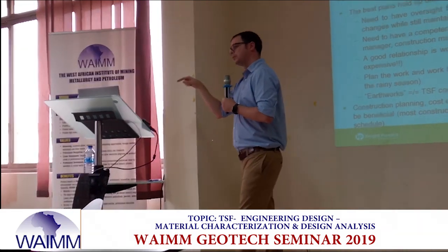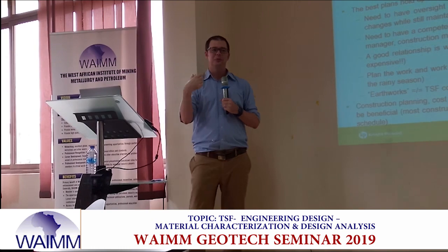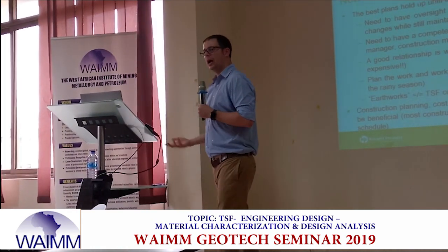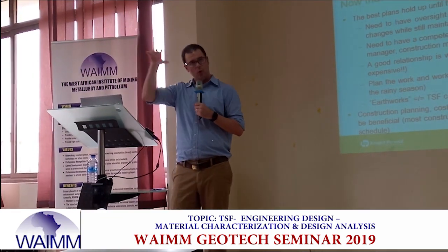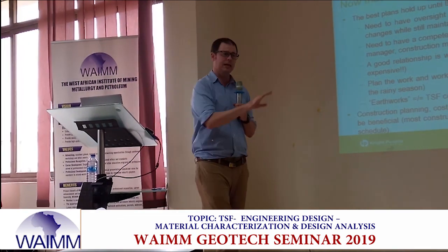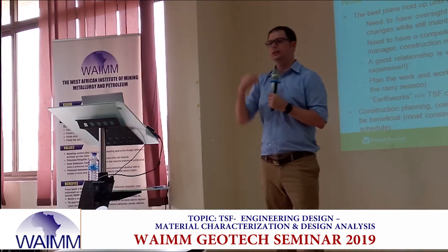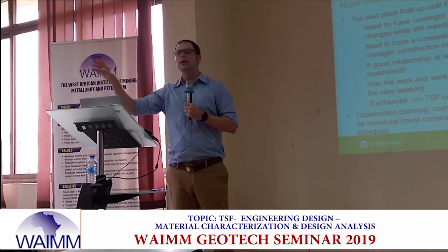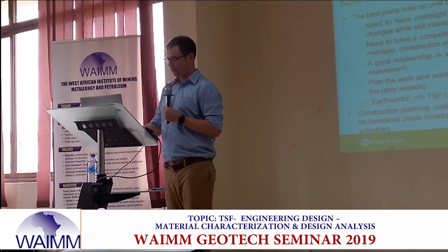And we can say, I know what's wrong with your half-meter wide trench now. You can't build it. Or now I know what's wrong with this design because it's too steep or the valley doesn't make sense to them. So we can put that into our analysis, or we can go to a guy like Billy Archer and say, Billy, I need you to look at something. Does it make sense to build this in this progression? And he'll come back and he'll say, you want to do ABC, but really you need to do ACB. And it'll make your life way easier. Okay?